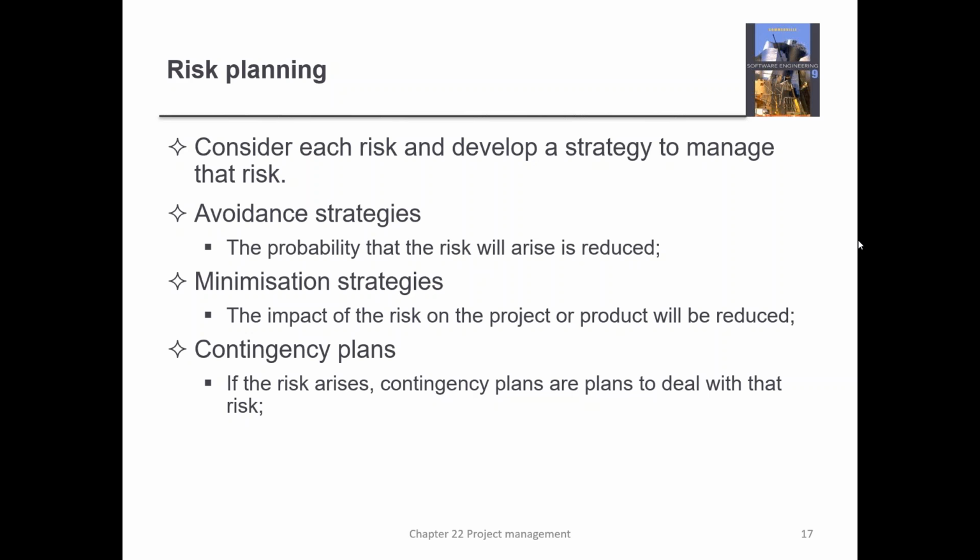All right. So the avoidance strategy is, you can't prevent the issue from arising. But what you can do is steer your organization or steer your staff away from those problems. So if you know that you're going to have a riot somewhere, you're going to ensure that your staff don't drive that way to get to work. Simple little things like that.